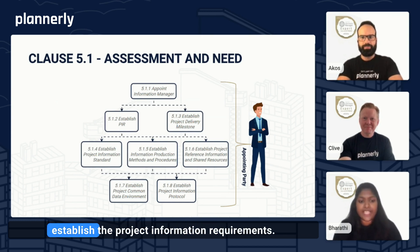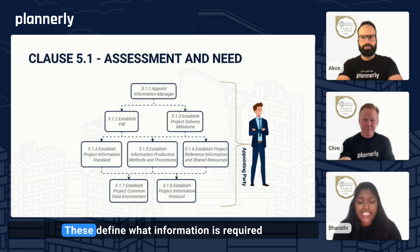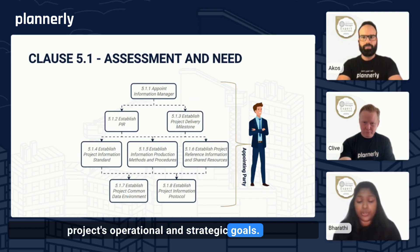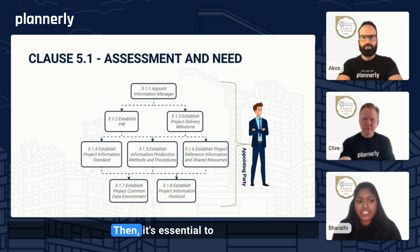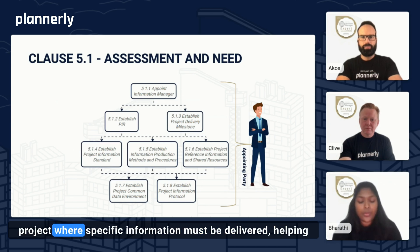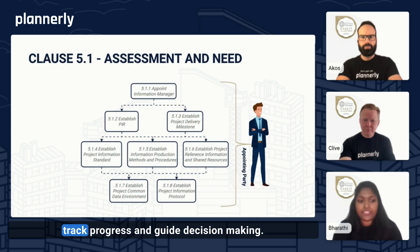Next, you will need to establish the project information requirements. These define what information is required at different stages to meet the project's operational and strategic goals. Then it's essential to set project delivery milestones — the key decision points throughout the project where specific information must be delivered, helping track progress and guide decision making.